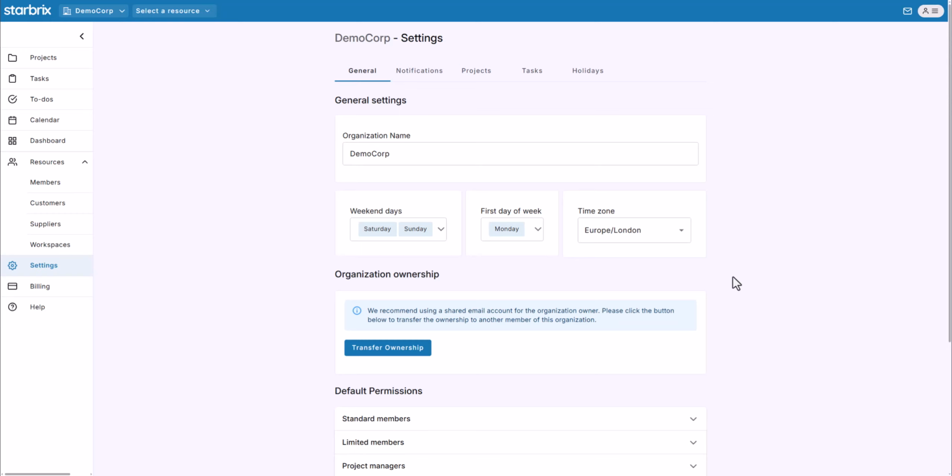And with a bigger time difference, it gets even trickier. Imagine the organization is set to Helsinki time, but your personal account is set to New York time. A project planned to end on Friday at 1800 hours Helsinki time would appear in your account as Friday 11 o'clock. You might think you still have the afternoon left. But for the organization, the deadline has already passed.